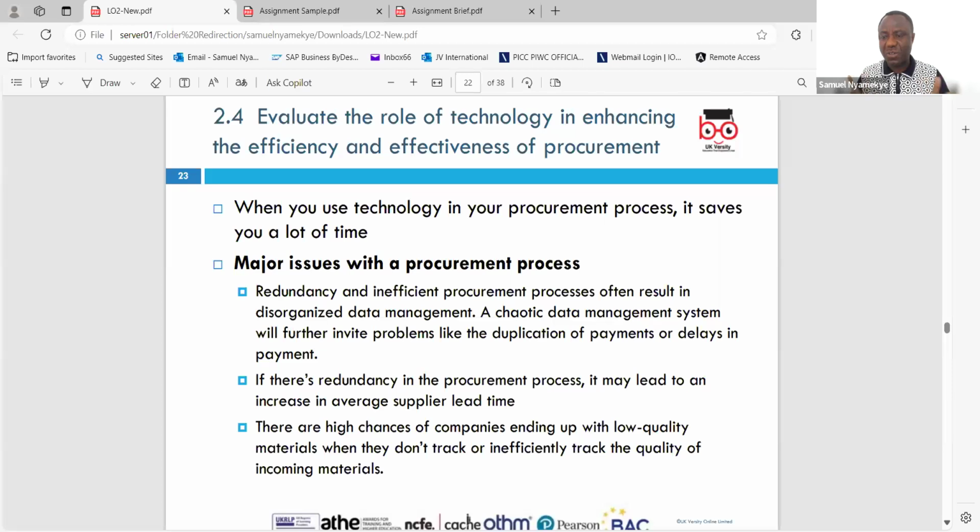You understand that it is going to be ready. If you don't have a system which normally we say progress or monitor or expedite, to know that, okay, the order was issued on the 1st, so 2 weeks, on the 14th, 15th. So there are people who have got systems, 3 days to the time somebody in expediting department or progress department will start chasing to find out whether we are still on course for the delivery. But you can do this if you have technology.